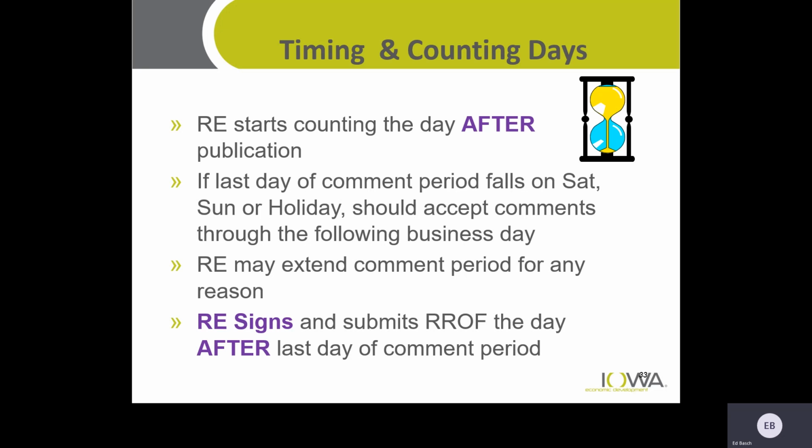So then the RE signs and submits the request to release the funds the day after, again, after the last day of the comment period. So you start counting the day after the publication or notice, let that run, and then the day after it's over, you can go ahead and sign and submit the request for release of funds.